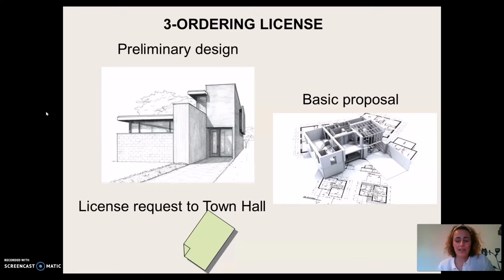When we have the previous information, that was the geotechnical survey and the topographical survey, and we have the regulations of the town in which the house is or will be, the architect sketches a preliminary design according to the wishes of the promoter.